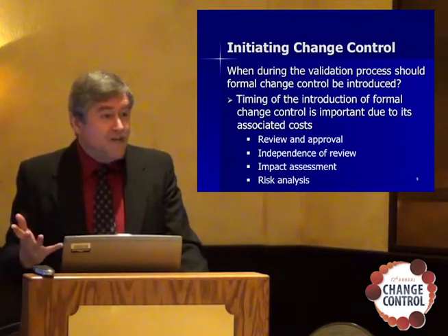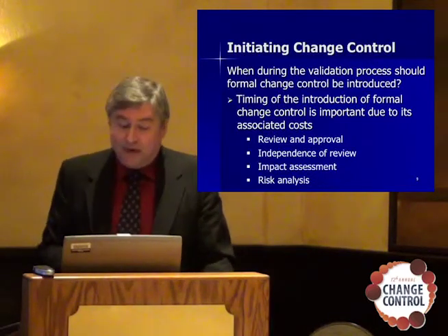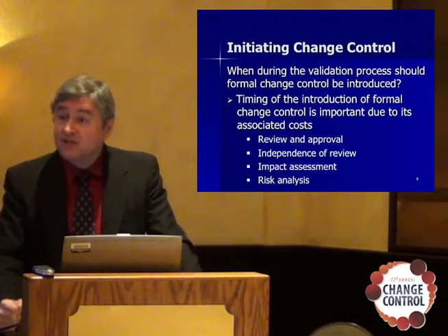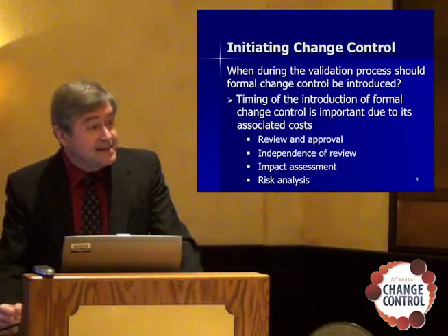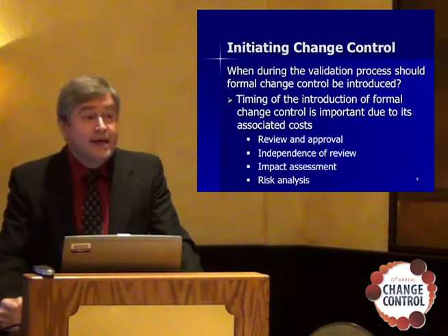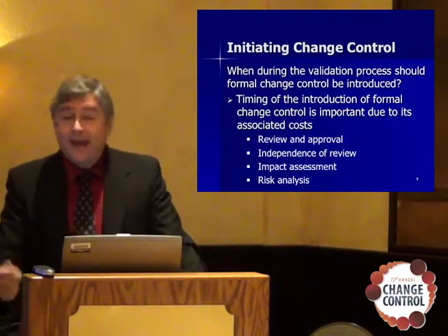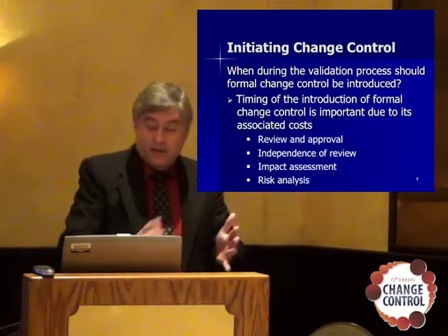That's the way it is in software. You're really making huge, significant changes at a rapid pace at the beginning of the project. You don't want to do an impact assessment for every one of those changes. Too expensive, doesn't make sense. And risk analysis. Again, it takes time to invest in a good risk analysis. And if you're doing that too soon in a project, you're doing yourself a disservice. So again, where's the good point? There's too soon and there's too late.